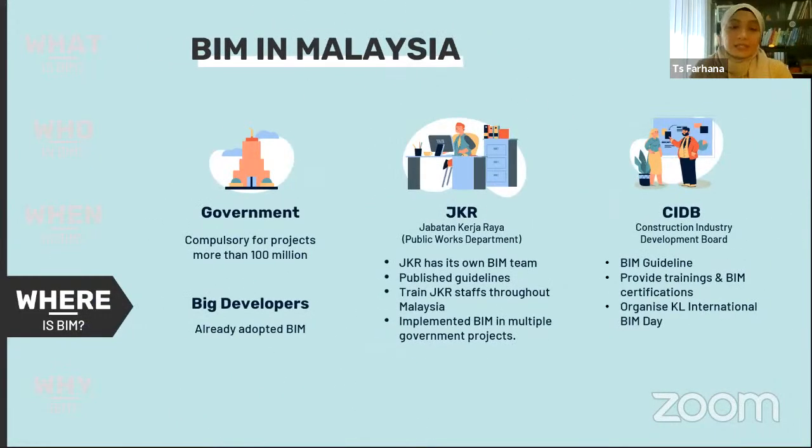So how about BIM in Malaysia? Actually in Malaysia, for government projects, it's compulsory to use BIM for projects more than 100 million ringgit. And big developers, Sime Darby, etc., have already adopted BIM. JKR has their own BIM team. Just 2 days ago, they finished the JKR BIM Day. They shared projects managed using a BIM approach. They publish guidelines, they train JKR staff throughout Malaysia, and they implemented BIM in multiple government projects.